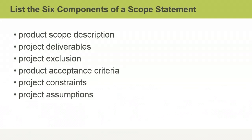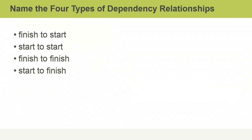The six components of a scope statement include: the product scope description, project deliverables, project exclusions, product acceptance criteria, project constraints, and project assumptions.